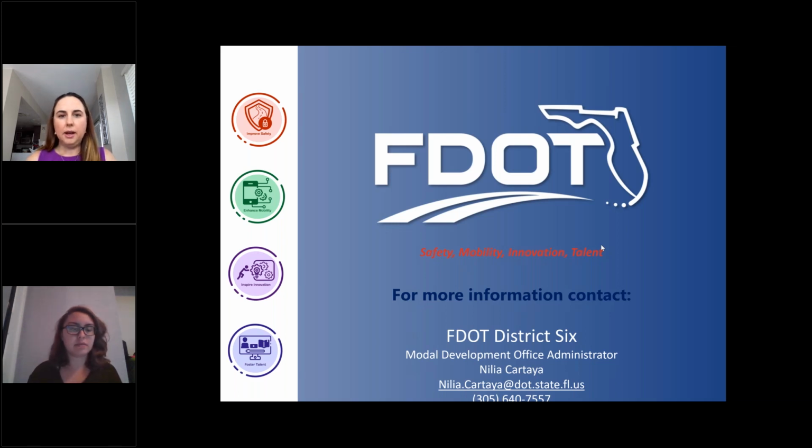That's a great question. One of the key next steps for all of these PDEs is to do what's called a transit service plan. And when we do that, of course, in conjunction with DTPW, who is the transit operating agency in Miami-Dade County, what that does is it will look at what's existing out there today, right? What do the bus routes look like today? And how do those bus routes need to be realigned to better serve and connect the communities to these premium transit corridors? So that's something that is crucial and is very much on our radar when we move forward with these projects.